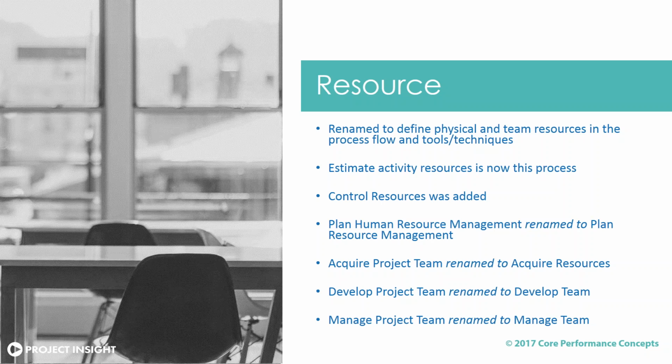Estimate activity resources is now in this process. Control resources was added because once we identify them and estimate them, we really have to control what's going on. So they added that process because that was kind of missing before. And then a lot of renaming: acquire project team is acquire resources, develop project team is develop team, and manage project team is manage team. A little streamlining makes it easier to get off your tongue, I guess you could say.